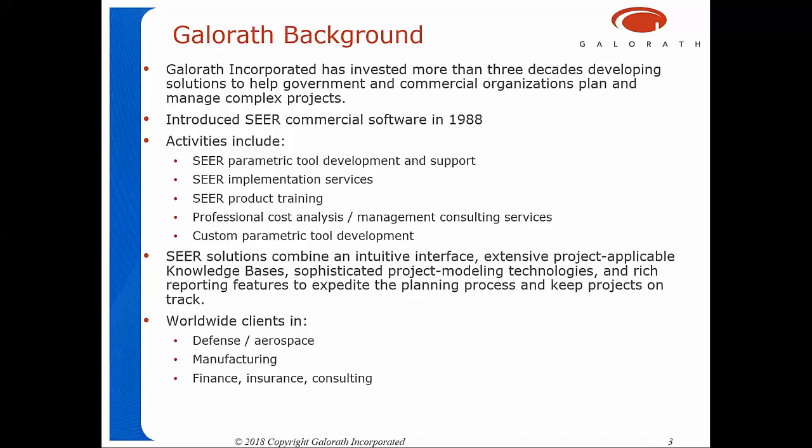Are you going to make it in-house? Are you going to subcontract out part of it? Are you going to be modifying a design that you've already done in the past and modifying that for different requirement? What is your life cycle? Are you going to be estimating development costs, production costs, operations costs? Any two of those or any one of those. You also tell it what standards you're going to be using. Is this a commercial project or is it a NASA project or a military project?